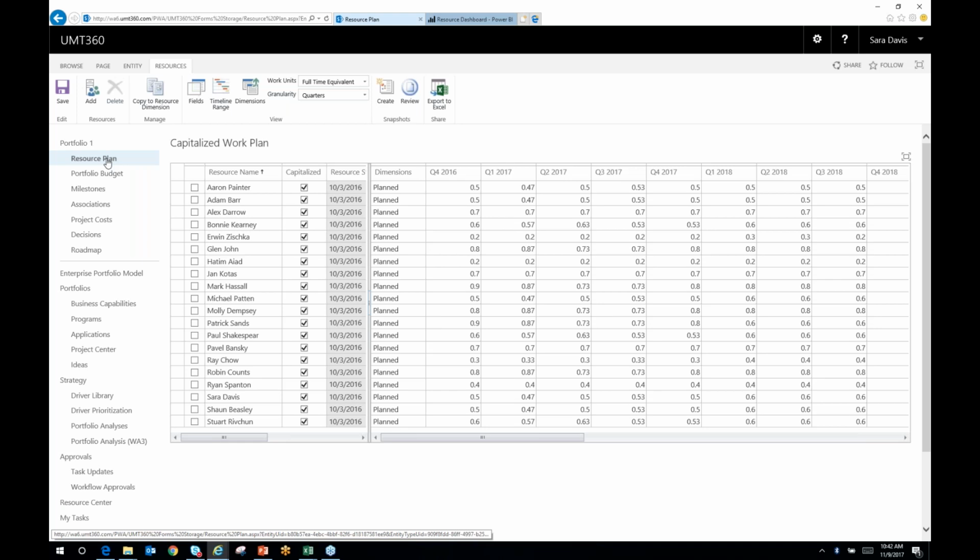So we're taking all the folks within this portfolio and saying, what do we think their capitalized work will be for this year coming up and potentially out years, depending on your forecasting duration. The benefit of this is you can maintain, for planning purposes, capitalized and non-capitalized forecasts at the portfolio level. And then I can start to report on that, bottom-up, the capitalized actuals and forecast work coming from the underlying projects, which is key.